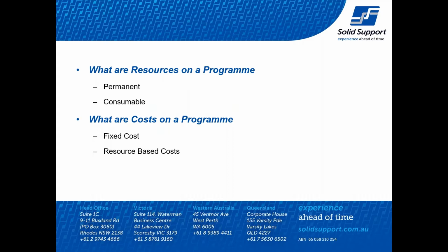Now, again, all of this follows up from what we looked at before with baselines and so forth. Once you've cost and resource loaded a program, you can baseline it and it will remember everything about your baseline, including those costs and resources. So when they change, and undoubtedly they will, as time goes on in the program, you can do comparisons between those. We'll touch on that as well today as we go through.